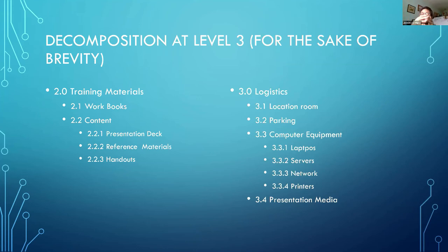And it's clear, you know that it's clear that for every part, it is a single deliverable. It is a single output. So pag sinamong computer equipment, at madami pa yan, it's better to break it down. Okay? So that's a rule of thumb.